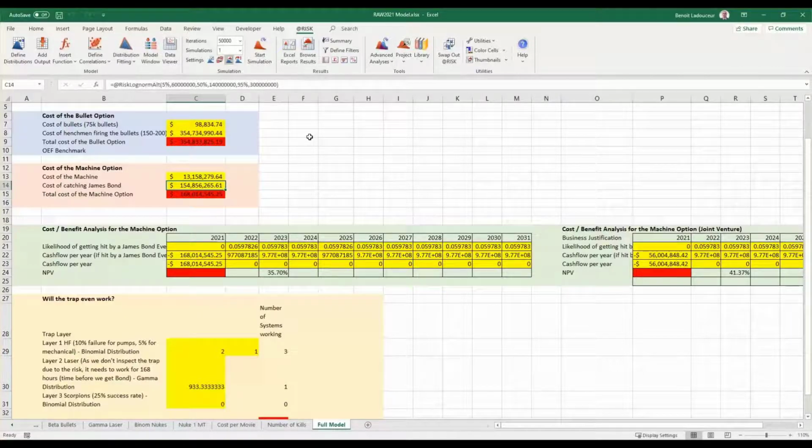And also sometimes people are unimaginative on how much things can go badly. So that distribution will capture that, as opposed to a triangular distribution where you put a hard cap on your distribution because you have a set limit which you won't go further out. So that's basically why I took that specific distribution here. And using the alt one means that it's easier for people around the table to have the discussion to figure out where those values get in, compared to trying to talk about the parameters of the distribution itself in terms of Greek letters.